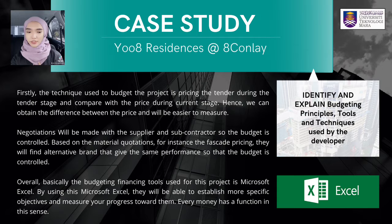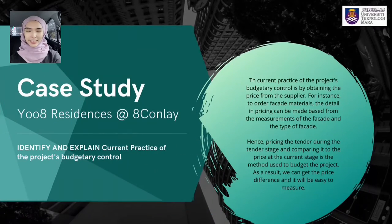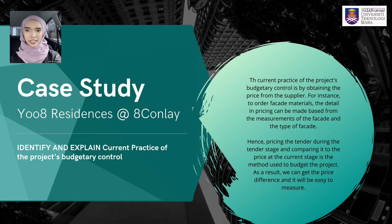Negotiation will be made with suppliers and subcontractors to control the budget. For example, for facade pricing, they try to find alternative brands that give the same performance so that the budget is controlled. The budgeting and financing tool used is Microsoft Excel, which is more specifically used to measure the progress of the Adconley project and for claims. Several problems have had effects on the financial budgeting.